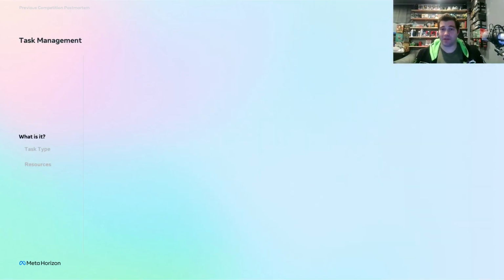Now we're going to go over to task management. And when we look at a completed GDD, you know, a simple game might be 7 to 10 pages. It is overwhelming. So what we want to do is take our GDD, break it down into individual tasks, and then it makes it a lot easier to digest.